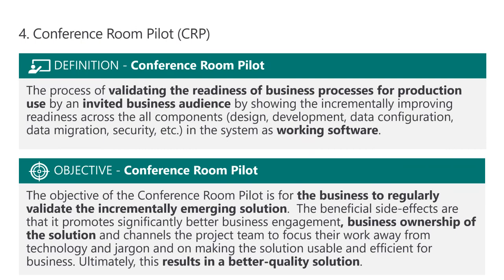And what we mean by a conference room pilot is the process of validating the readiness of business processes for production use by an invited business audience. So the idea is that you show the business process first as a logical flow in terms that the business understands. So this is all in business language that they understand, and then you show them that process within the Dynamics application. So you're saying, you remember we said this is the process.